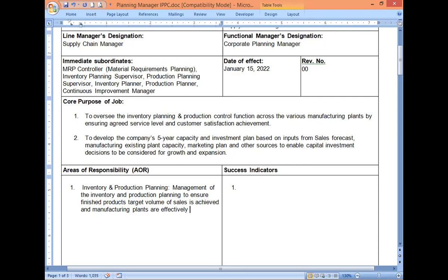The warehouse should have at least, for one material for example, 30 days to last, or maybe 60 days to last, especially if you are procuring these materials from overseas, right? You need lead time, because you need to include in the equation the shipping period. Maybe it takes 1 month or a couple of months for these products to arrive in the Philippines. You have to equate that in your days to last, or DTL for short.